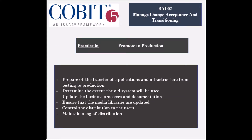The activities involved in this practice include preparing for the transition of applications and infrastructure from testing to the production environment. The extent of reliance on the old system has to be determined before the total transitioning to the new systems. The relevant business process and system documentation should be updated, and all media libraries should be updated according to the new system versions, with older ones archived.